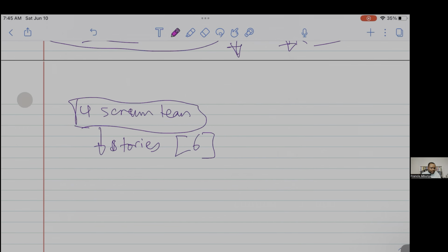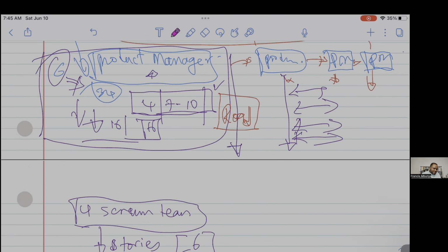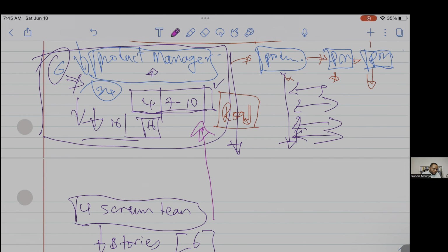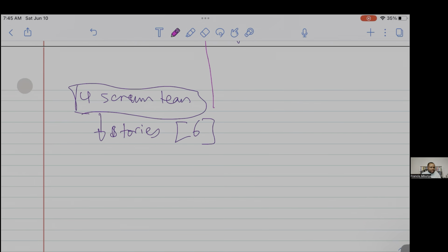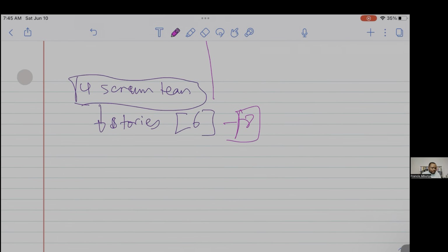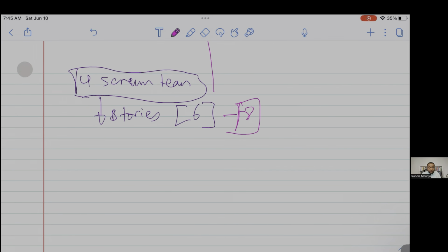What happened right here? The release planning cannot go well because there was a mistake in estimating what is needed up here. So the Scrum team comes and says, okay, we cannot deliver this within 6 months. For us to work with our current capacity, we need 8 months to do this, right? And management starts negotiating. Why? Because they've committed to a budget. They've promised the client.